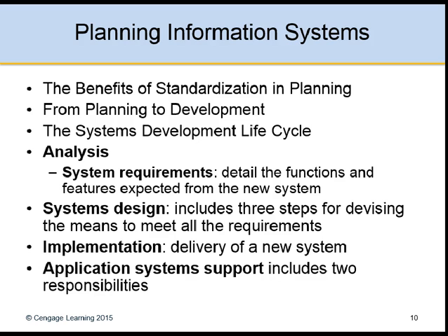Technical feasibility study determines if the components exist or if they can be developed, and also determines if the organization has adequate hardware and infrastructure. An economic feasibility study is a cost-benefit analysis that shows the costs and benefits of the proposed system. A return on investment is calculated, and that's the difference between the stream of benefits and the stream of costs over the life of the system.